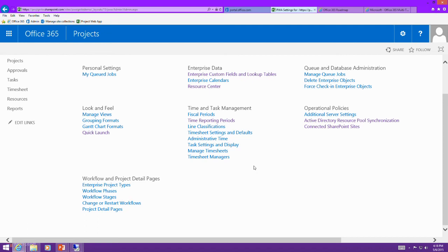When you're in project permission mode, you'll see the option in this UI to turn off user sync. Turning off user sync will actually have some significant performance benefits when you're creating projects in PDPs. The other side effect is you'll get the desired effect, where you let your folks manage the project sites' security within SharePoint. You can turn inheritance back on, and we won't come in with user sync and update the users.